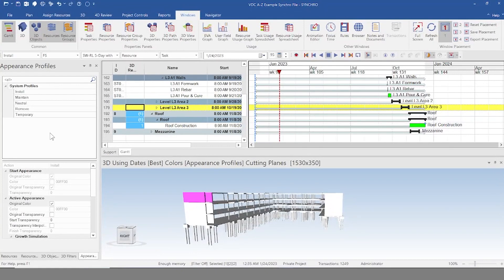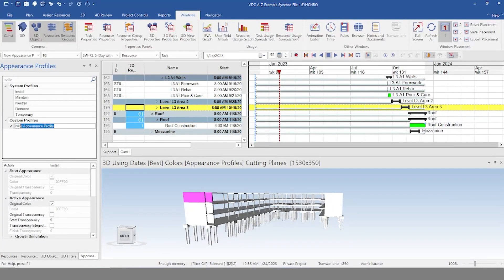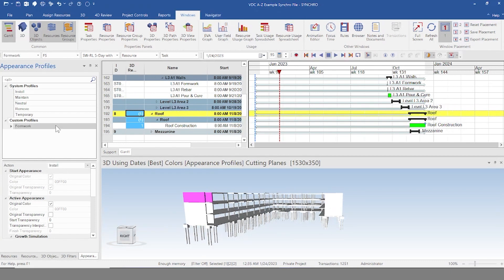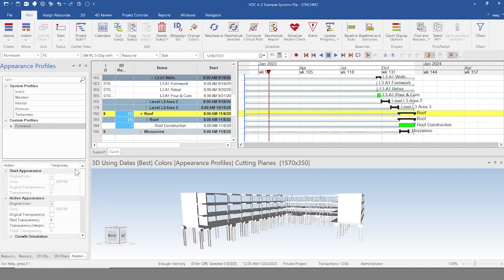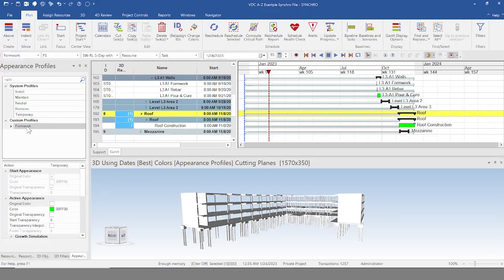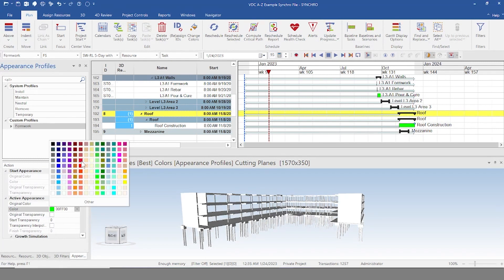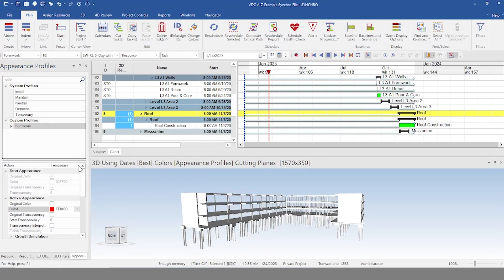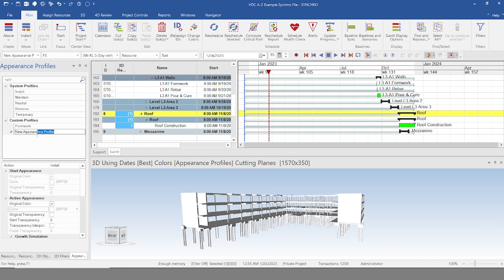So we're going to right click in this window and we're going to add. We're going to write formwork. There we go. So we're going to click our formwork appearance profile. We're going to have that be temporary. And then we're going to unclick the original color and we're going to choose a color to go with the formwork. So let's actually choose red. There we go. And then we're going to make another one. And we're going to make one for formwork, for rebar, and for pour and cure.